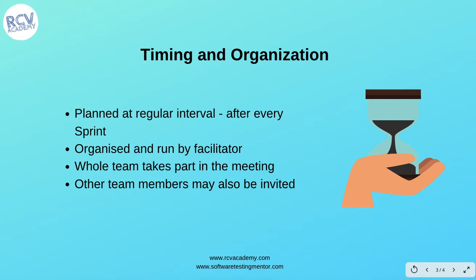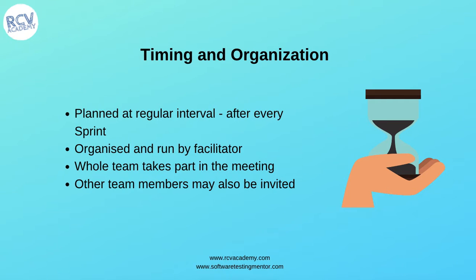Next is timing and organization. Retrospectives are planned at regular intervals — after every sprint or iteration in agile development. In Scrum, a retrospective meeting is planned after each sprint. These meetings are organized and run by a facilitator, and the whole team takes part.